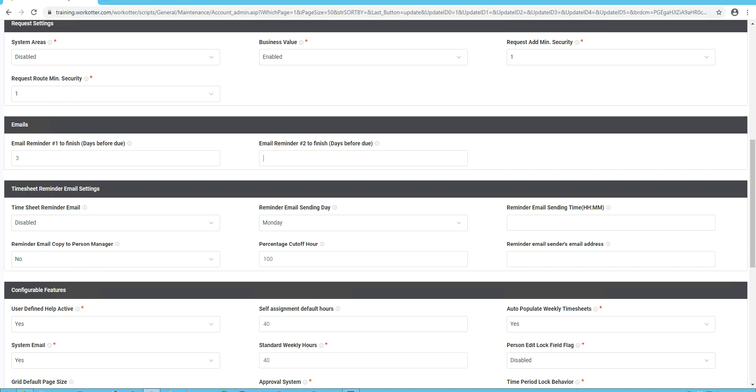The second email can be sent then, if it's still not complete, maybe you set zero, which means the day it's due. You can even set these to negative, like negative one means the day after it's due. So this just allows you to configure a couple reminder emails to your user community. If you leave them blank, that just means no emails will go out.